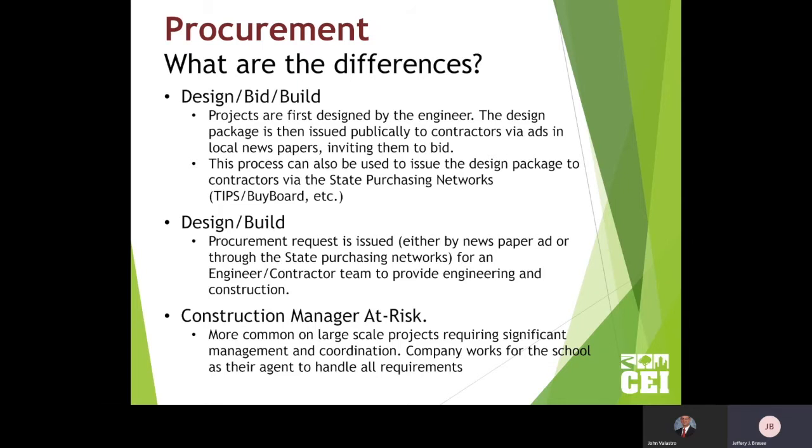Design, bid, build. This means we're first going to design it, then we're going to bid it, and then we're going to build it. In this circumstance, the engineer works for the owner most times all the way steps A through E, the whole process. We're here as engineers to put the design together, work with the client, make sure what they want is conveyed in paper, whether it be plan specs and other documents.